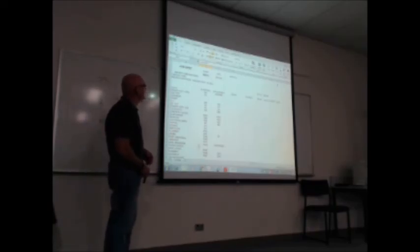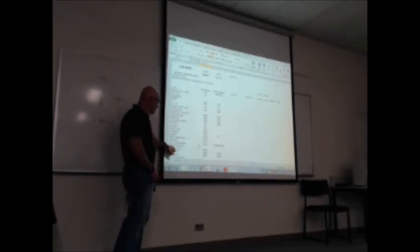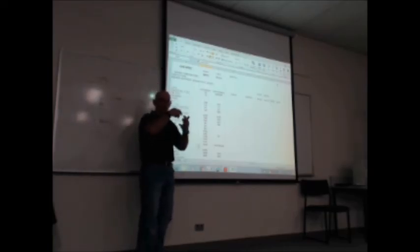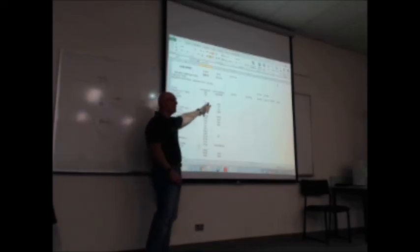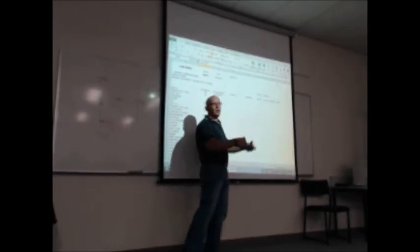So we want costing summary. So this is your costing summary. It lists all your cost centers. So you're using this as a reference. When you've worked everything out and you've got all your different parts worked out with all the scratchings and everything to come to the final price, you then put that price in here. And you break it down to a subcontractor or your labor and materials, depending on how you've worked it.